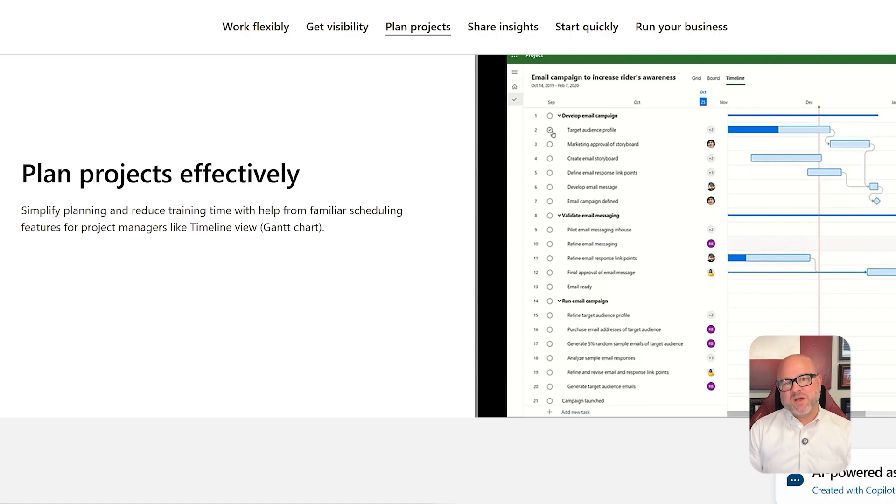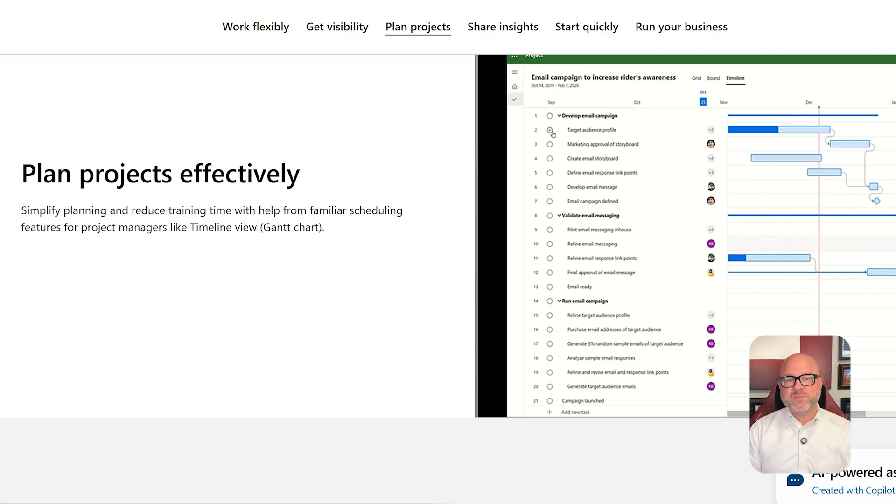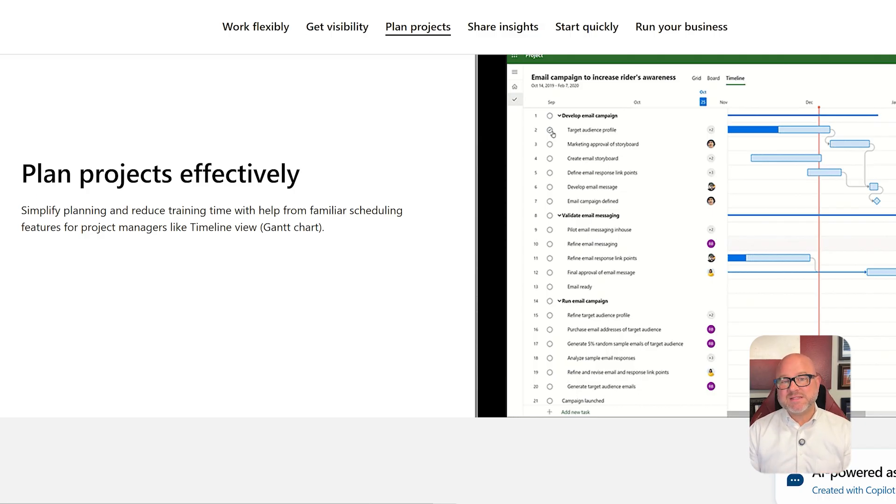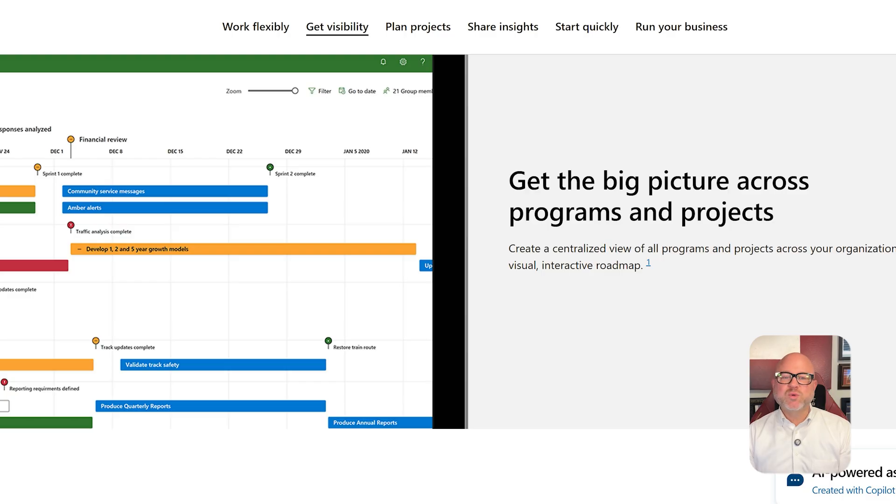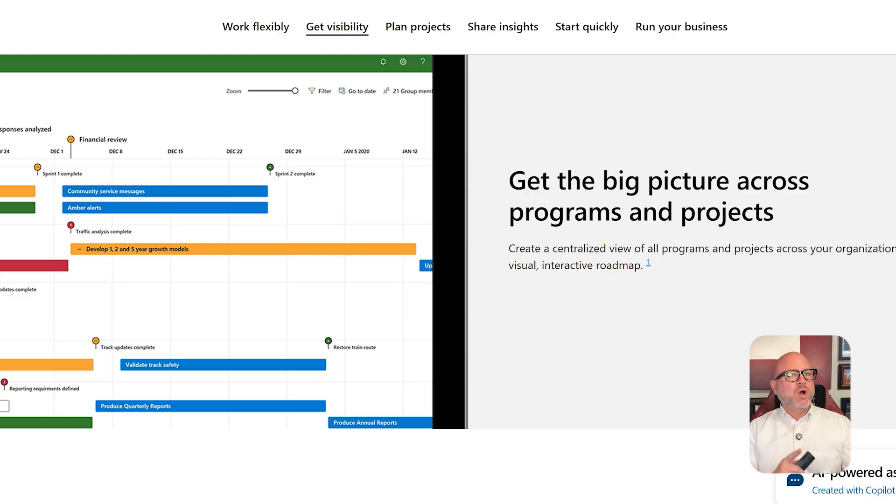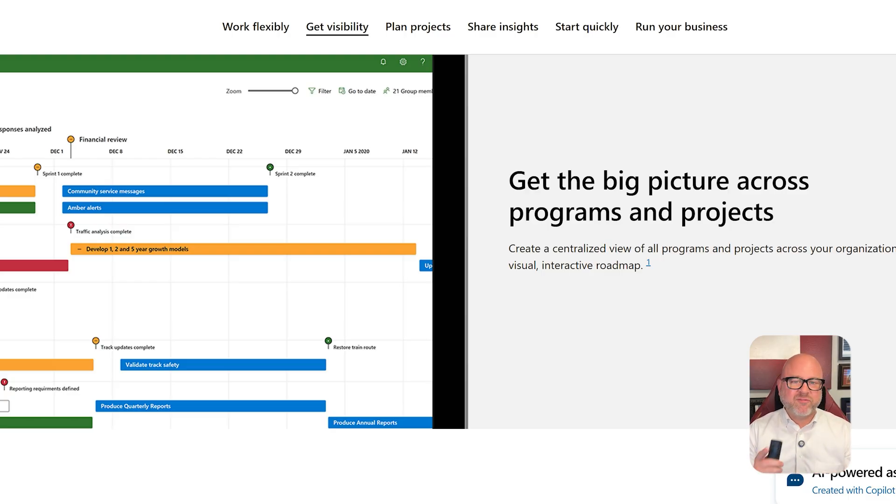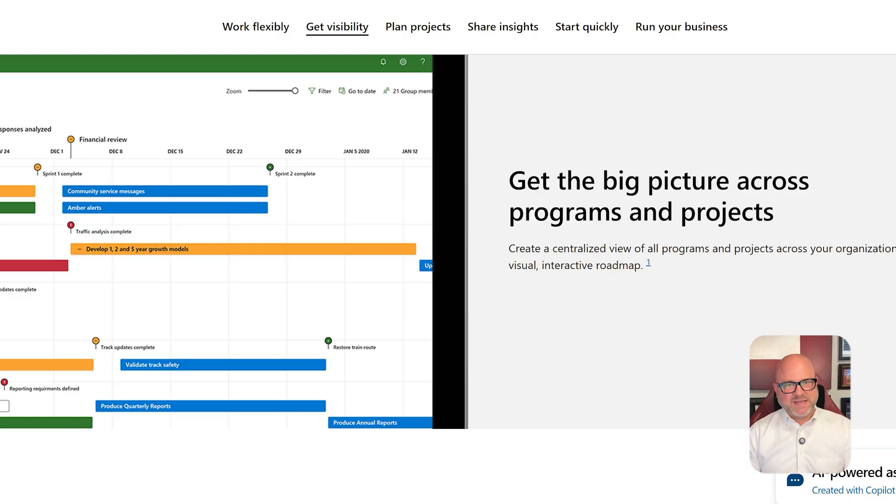Project, however, brings in Gantt charts, critical path planning, roadmaps, resource allocation, and financial tracking. It supports baselines, dependencies, and portfolios, tools that serious project managers rely on for long-term, multi-phase initiatives. So if your work involves budgeting, cross-team planning, or timeline forecasting, Project clearly takes the lead.